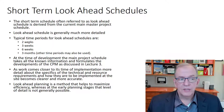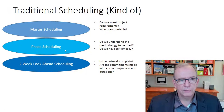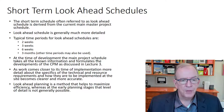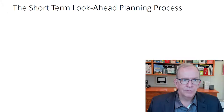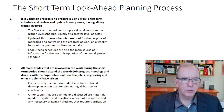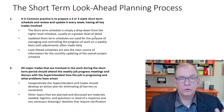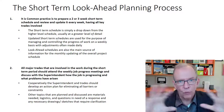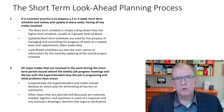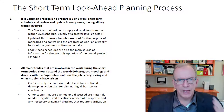Short-term look-ahead schedules can be two weeks, three weeks, six weeks, or three months — and three months would be the example for phase scheduling. As the work gets closer, the level of detail gets stronger, or at least that's the way it's supposed to play out. Some of the things we do in traditional short-term planning — when done well — is management by wandering around, MBWA. We make sure we know what's currently going on on the project so we can really understand what's coming up in the next two weeks.